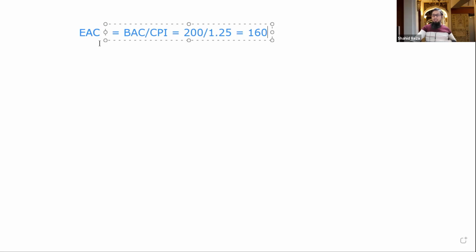So EAC means estimate at completion. If we move the same way, how much total project budget do we need to complete the project? Remember our baseline BAC was $200, but as we are doing very well, the new completion estimate will be $160.